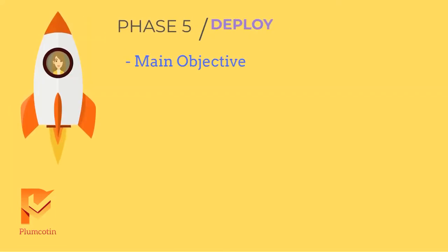Stage 5, Deploy. Once it has met the exit criteria for the test stage, the project will move to the deploy stage. This stage consists of the steps to move the Workday service into production. This occurs when training for client end users is completed, transactions are no longer entered into the legacy system, a final data load to Workday is completed and validated, and a go-live checklist is completed prior to cutover.